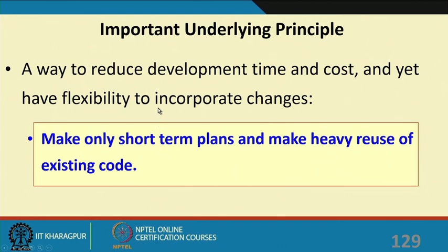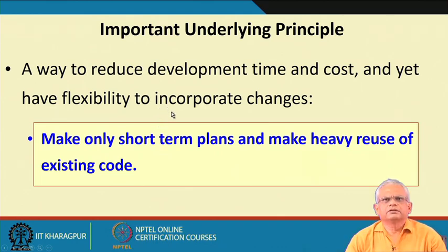This is, as we said, an incremental model. Here increments are decided and only short term plans are made, and there is heavy use of the existing code. In contrast to the waterfall model, this model is very efficient.